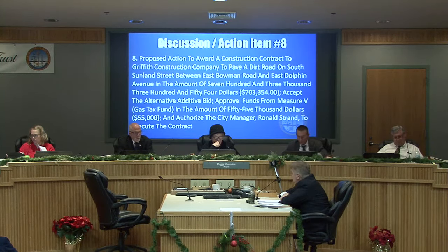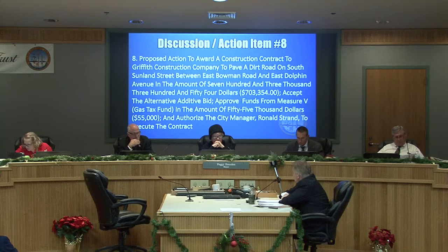One of the things that I've noticed in my many years doing this type of job is that when you put contracts out to bid in the summer, contractors say, well, I'll find some way to fit it in if you pay me enough money. And that's what I believe happened on this particular project. We've put it back out now so that it's winter when they're trying to set up their summer schedule to make sure they have enough work, and the bids came in quite good.